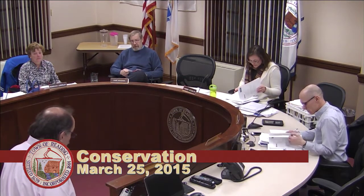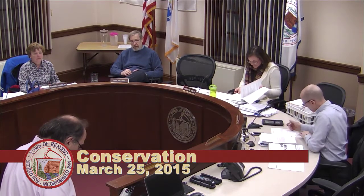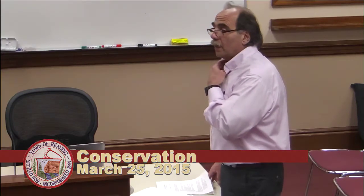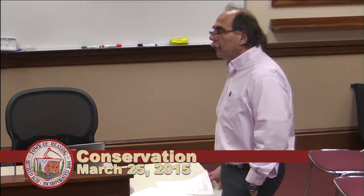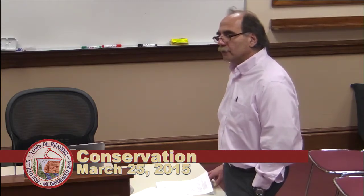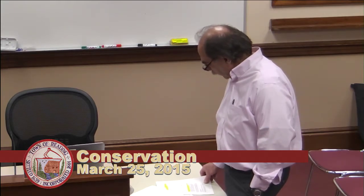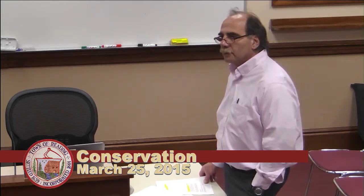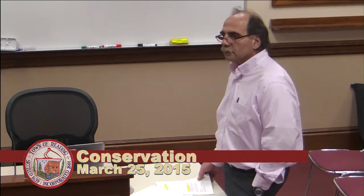Okay, category one, we can do it by right. Category two, we would consult the conservation administrator and get his verification that it falls in category two, go over all the BMPs, how we plan on doing the work and the BMPs that we're going to employ. If he's satisfied that it does fall in that category, it's with his approval. If it falls under category three, it's a little bit more detailed. That's when we come before the commission and explain in a little more detail what we're doing, and probably submit a little handout so that you can go through it, and that's only with the commission's blessing.